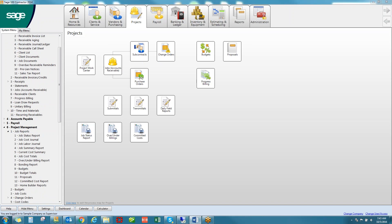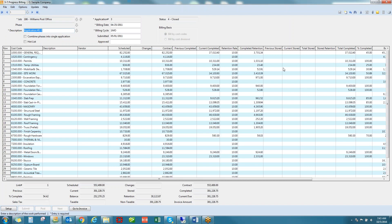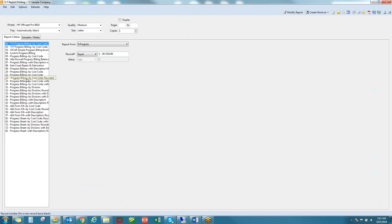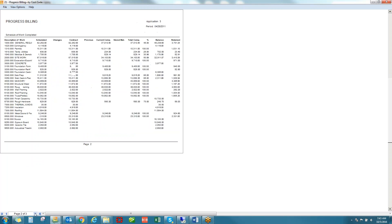The project details also feed into billing. Budget or proposal figures can be used to generate AIA-formatted progress billings. Here's an example of one of the billing formats available — a cover page followed by a schedule of values.